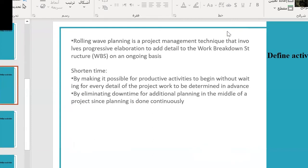Rolling wave planning is a project management technique that involves progressive elaboration, adding detail to the Work Breakdown Structure (WBS) on an ongoing basis. It shortens time by two methods: first, by making it possible for productive activities to begin without waiting for all project work details to be determined in advance; second, by eliminating downtime for additional planning in the middle of the project, since planning is done continuously.